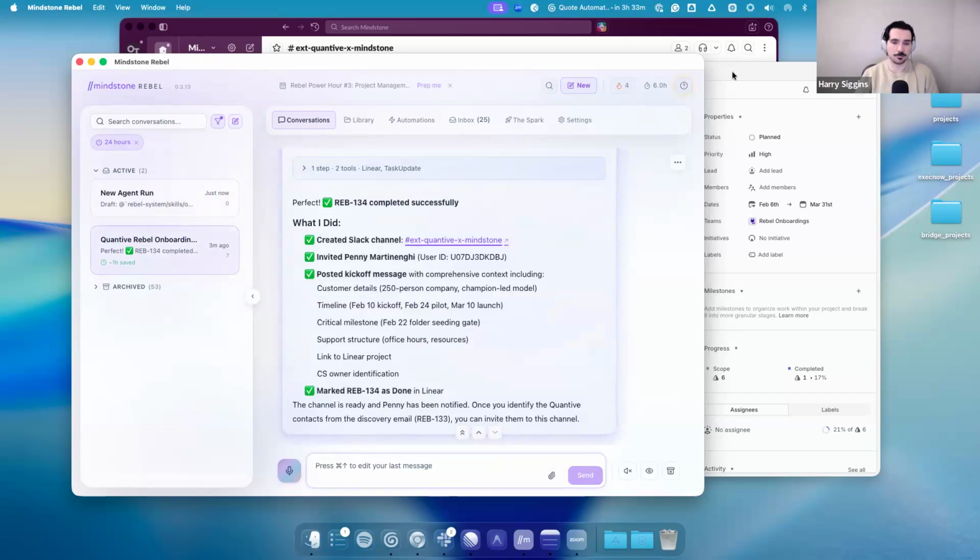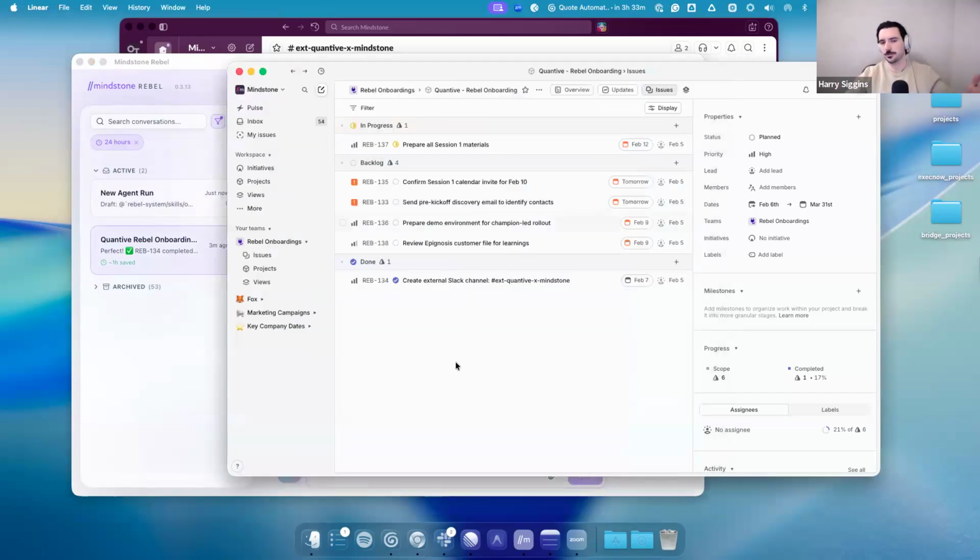Yeah, absolutely. I'd say if you came into Asana or Linear in this example, and let's say the timelines get compressed, right? Client comes back, we're actually not moving from March 31st, we're moving to March 7th, right? That would compress things, and maybe you decide we're going to delete some of these tasks in here, and we're just going to skip over them. One, you could have Rebel determine that for you, or you could have Rebel review some of the changes that you've made or review the latest status of things, and then process that into Slack as an update message like, hey, we're compressing these, we've removed these, and such, and go from there.